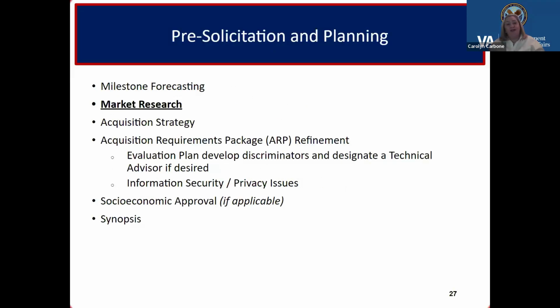Okay, so this is the pre-solicitation planning. When an acquisition is assigned, normally we'll have to work together to come up with some milestone forecasting. When is it needed? Do you have something that might be expiring? Is this a new start? Is there some kind of policy driving when this award has to be made? So that's really a discussion to have on day one, day two, within those first 24 to 48 hours of an acquisition package being assigned to your contracting team.